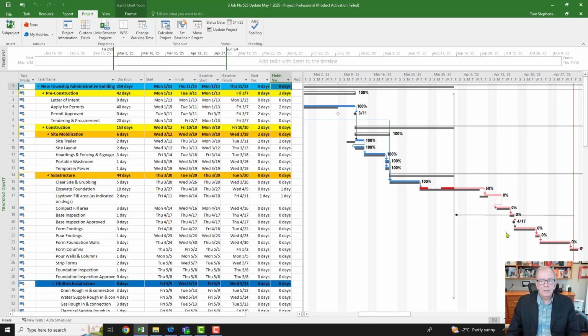This process continues and goes on and on. You won't need a recovery if things went exactly the way you planned, right? So if everything went exactly as we planned here, you could just update everything and say that's it. But if there's something that changed and you need to do a recovery, then you just do the recovery. So I'm hoping that with this step-by-step process, you're seeing that we would have a good understanding of what's happened in each time space. And it's well documented, and that's called the contemporaneous schedule, the as-built schedule. You're writing the story of how this project was built. You could always go back to any time period and look at it and analyze it if you needed to.